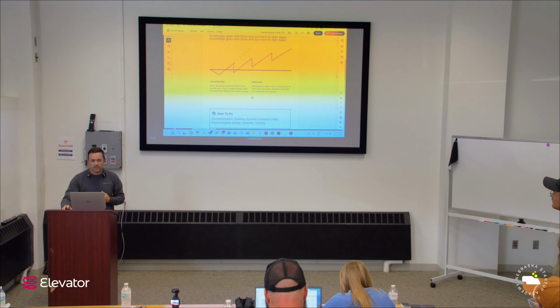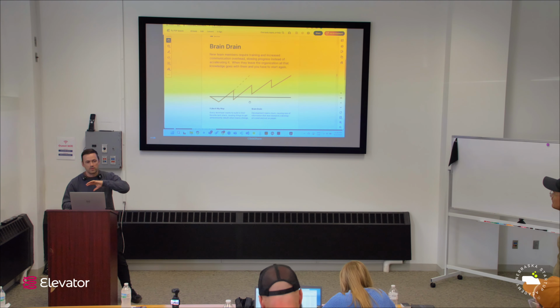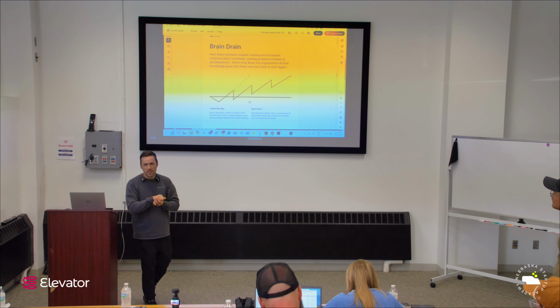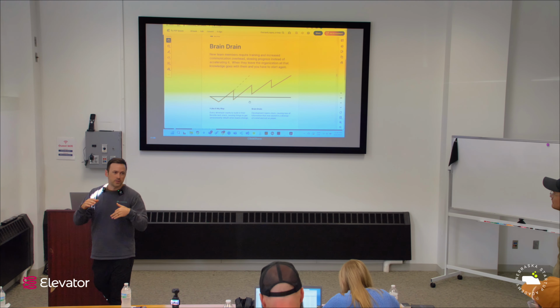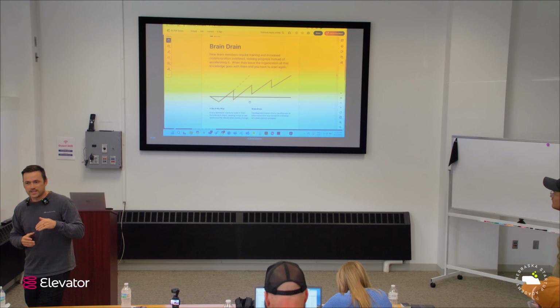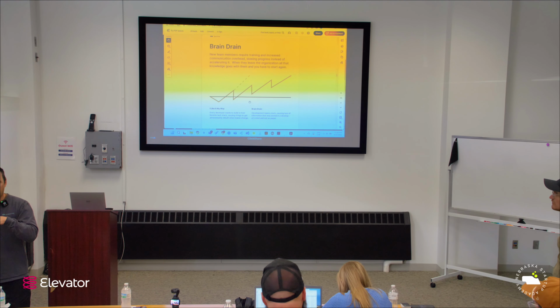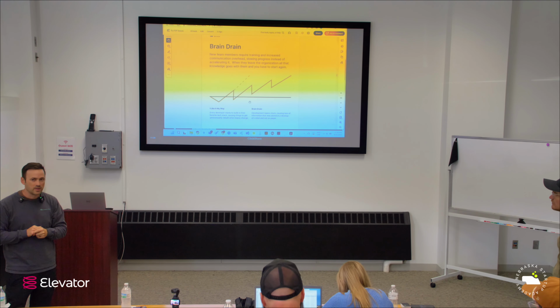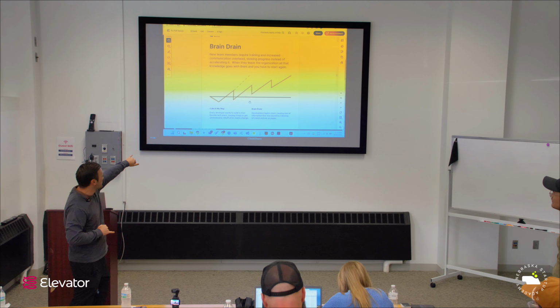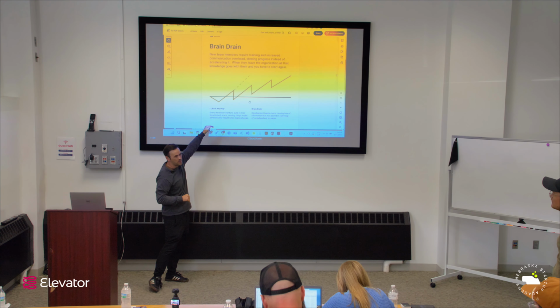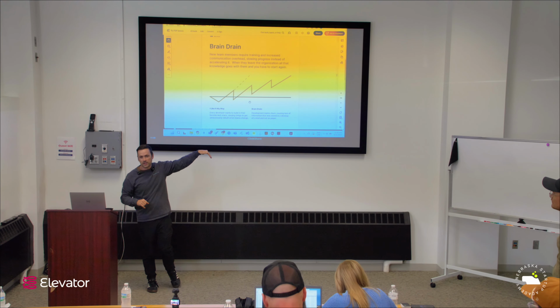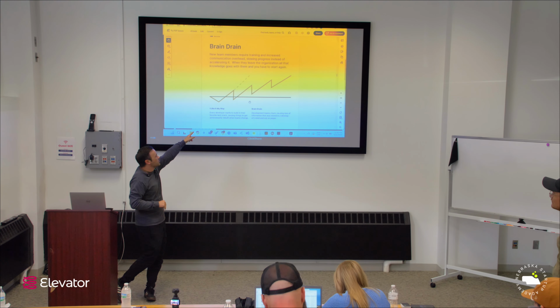And then the last section on why software is really hard is the brain drain. Every time you add a new person onto a software project, it takes that person a long time to get ramped up in what they're actually doing. So in the beginning stages, it's actually a negative efficiency to your company. When you add someone, you have to train them. They're not going to build something yet, and then they start being efficient.